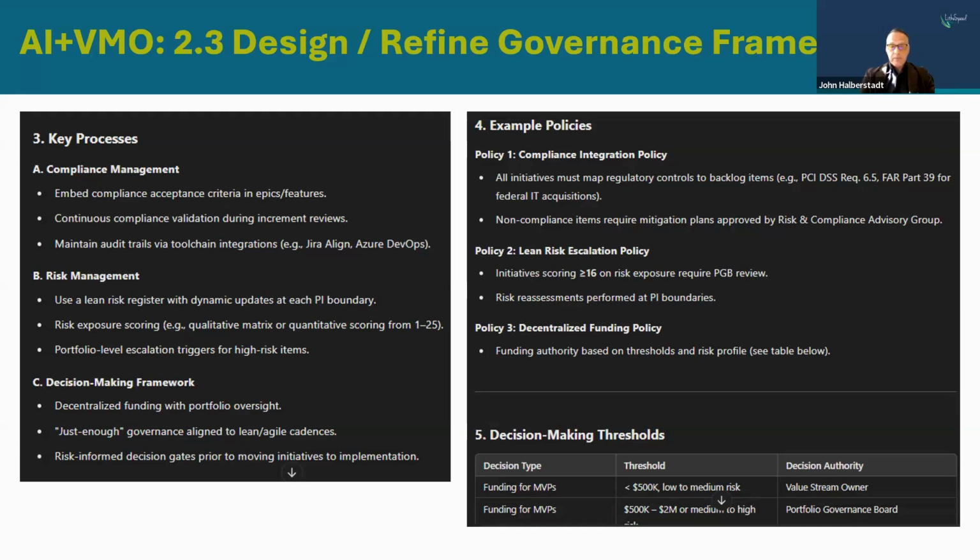I don't know if I'm making auditors happy, but I've used the Jira audit trail, the Jira history, when I've had external auditors come in from various regulatory bodies that were doing audits. They've been more than happy with me being able to pull up a Jira issue and show all of the history, who did what, who approved it, when, where, etc. So use what you can to have that as auditable as part of compliance management. That's another great piece of practical, tactical, usable advice that the tool provided.